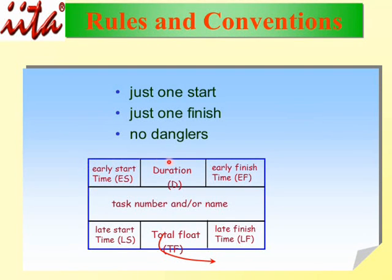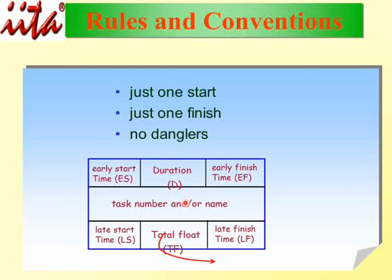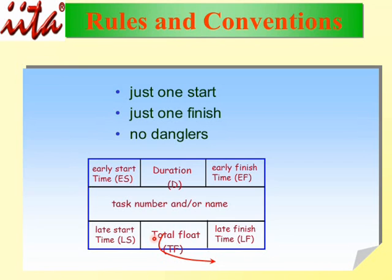The convention uses a rectangular box. On the top-left is the Early Start time, called ES. Next to that is the Duration, called D. The top-right corner is the Early Finish time, called EF. In the middle of the box is the task number or name. At the bottom-left is the Late Start time, called LS. Next to that is Total Float, called TF. On the bottom-right is the Late Finish time, called LF.